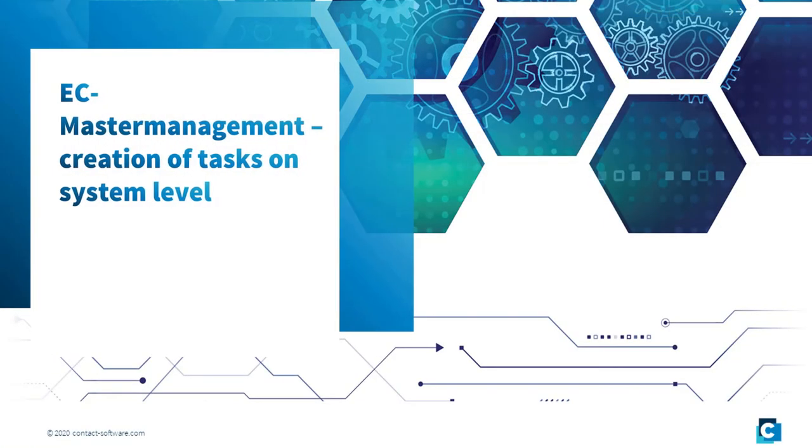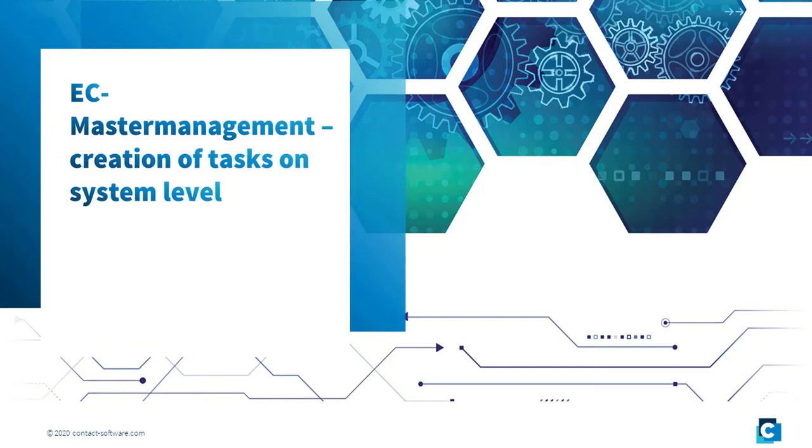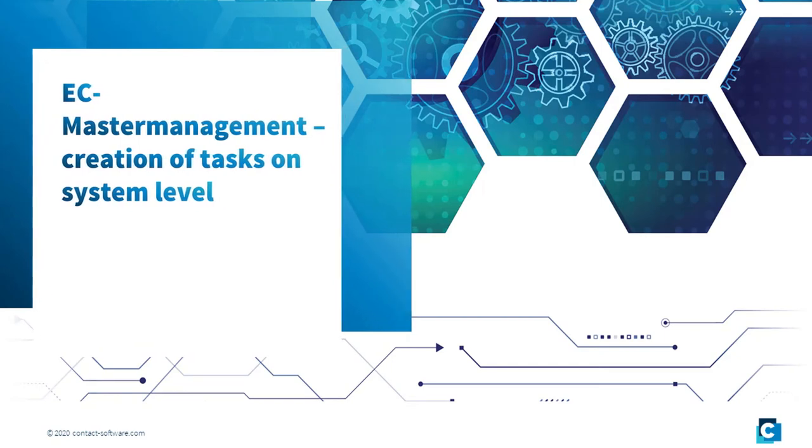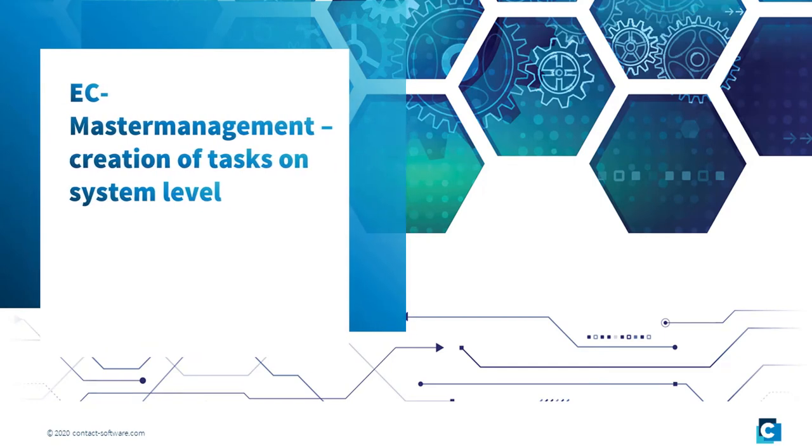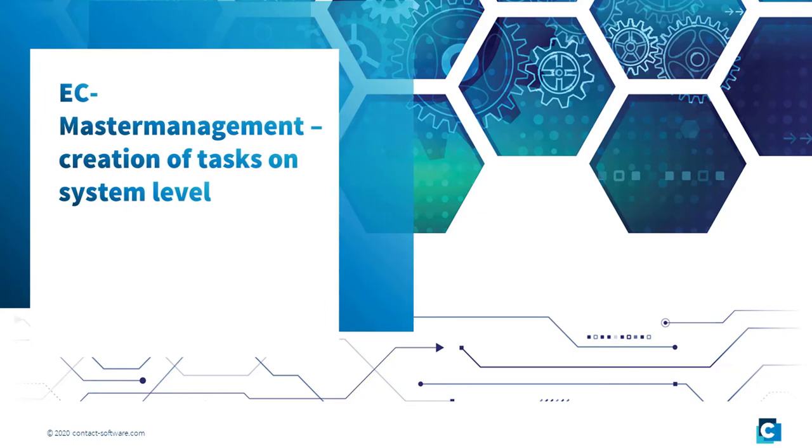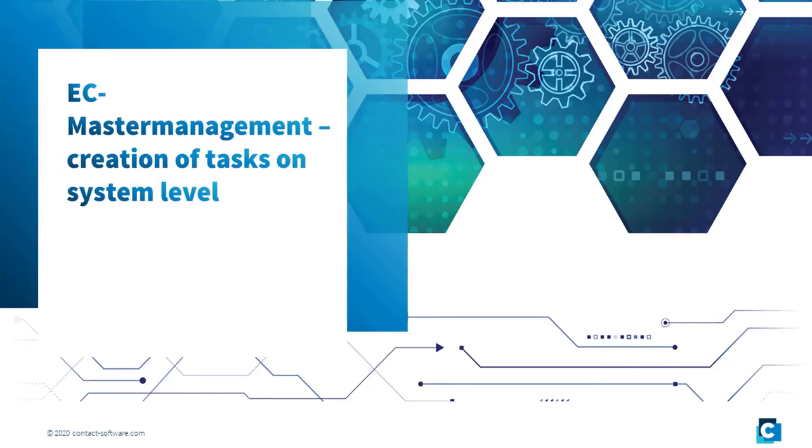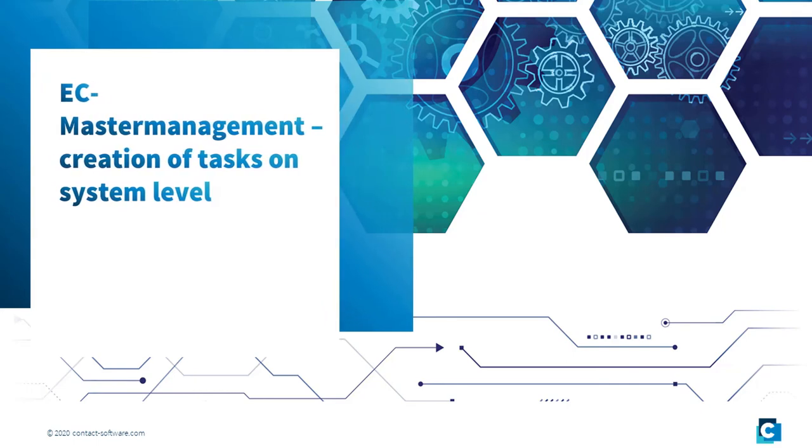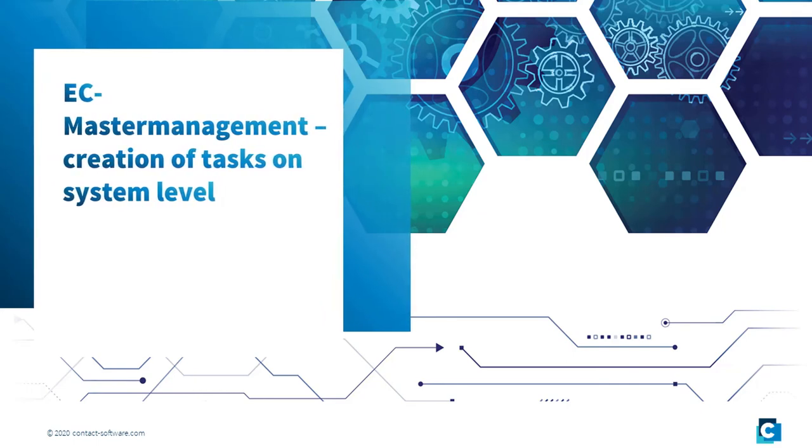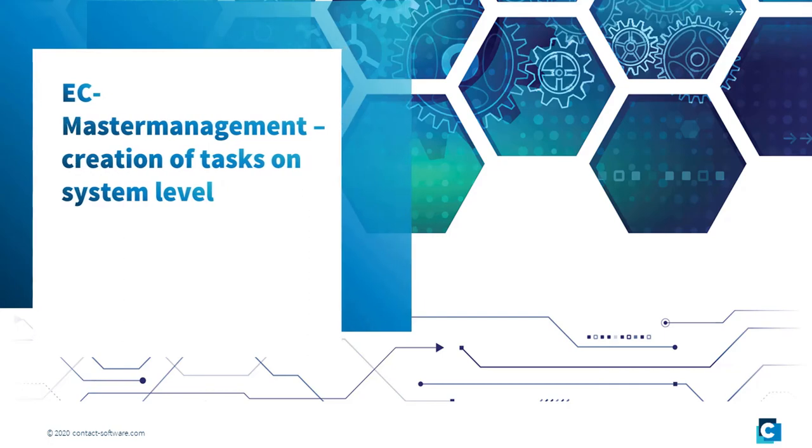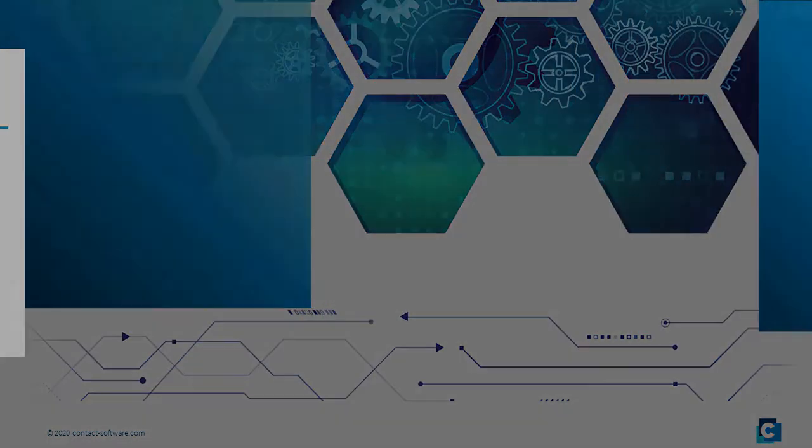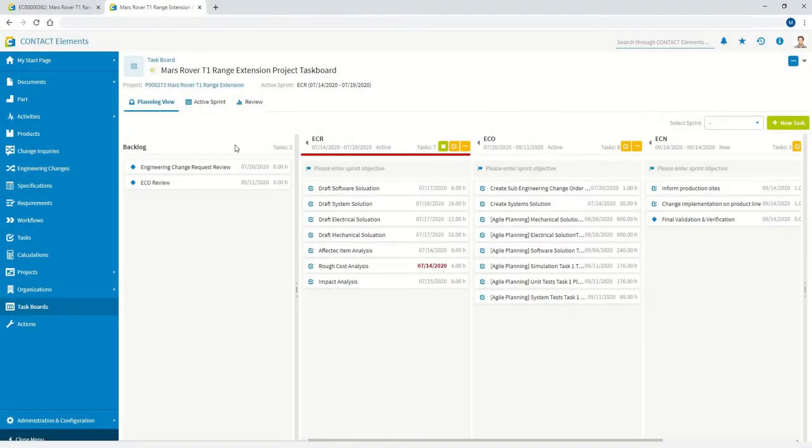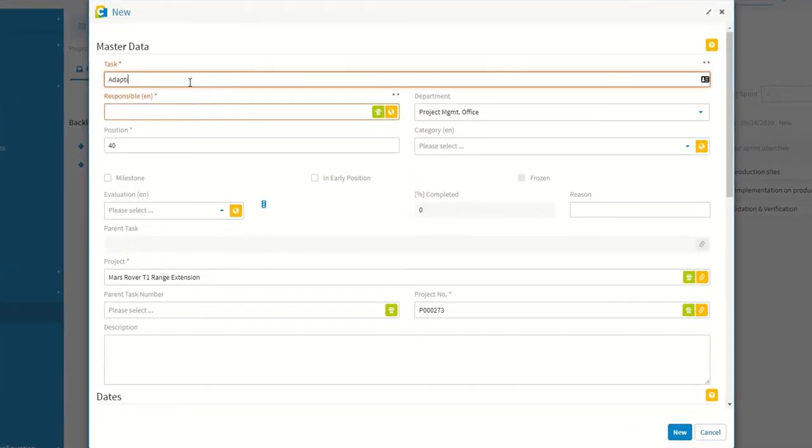Tasks and process information need to be exchanged between the EC master and the domain's participating systems. In the engineering change request phase, these tasks might be review tasks or, in the engineering change order phase, specific adaptation tasks. To do this, new dedicated task objects can be created in the context of an EC project in Contact Elements and assigned to a domain.